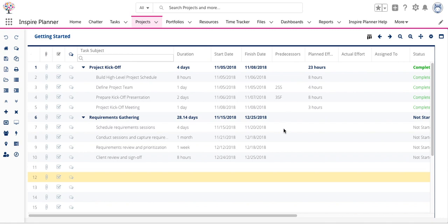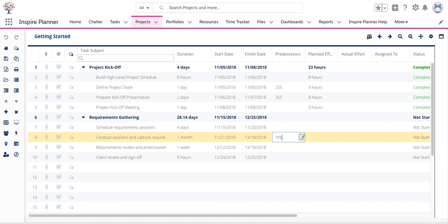To add a new predecessor relationship, just double-click in that field for the task, type in the row number of the predecessor, and then type in the code for the relationship. I'm going to type in FS for finish to start.